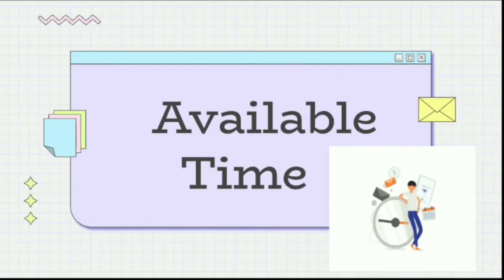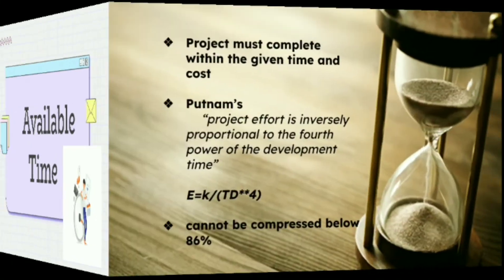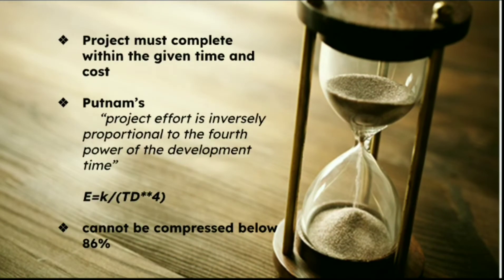Available Time: Total project effort is sensitive to the time available for project completion. Software projects require more total effort if development time is compressed or expanded from the optimal time. The development schedule cannot be compressed below 75% of the normal schedule regardless of the number of people or resources utilized. Putnam states that project effort is inversely proportional to the fourth power of the development time.